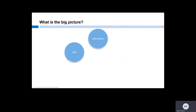Stakeholders — who are our stakeholders? They're the people, departments, and organizations who are impacted by our study. The PI, department managers and leadership, team members, CRU, funding source, IRB, and FDA are prime examples. Stakeholders may change in importance as the project moves through its life cycle. For example, the IRB may not be immediately involved in a study while the protocol is being written, but if you don't consider their needs early in the project, you may experience delays because changes need to be made to get the study approved. Understanding how all of these stakeholders relate to each other is another key to success.